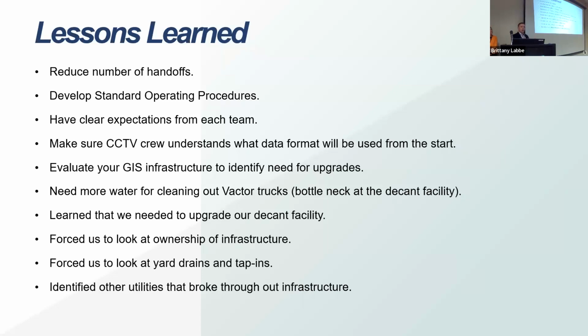So what we have found is that they looked at some things sometimes, but they didn't add it to the data sheet. And then it makes it hard for the next consultant to actually do the review and do the risk assessment. So make sure everybody knows exactly what the next group needs.